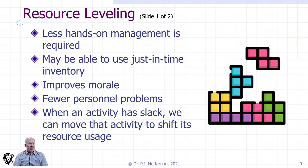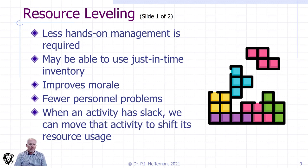If we talk about resource leveling, which is really about trying to make things efficient, both of these look very similar when you do them. I've always likened both of them to a game of Tetris, as we try to stack the resources efficiently within a flat pile of bricks. You'll see as we look at some examples why I think of it this way. If you can level the resources, you gain less hands-on management because everybody's gainfully employed day to day, and you're not moving people from task to task and project to project, losing efficiencies and startup time.